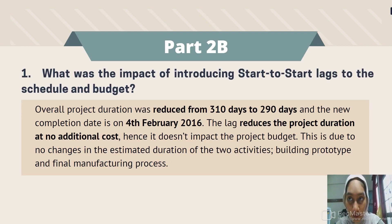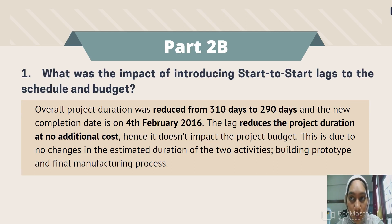The former measure managed to bring forward the project end date, and the introduction of a start-to-start lag overall reduces the project duration from 310 days to 290 days at no additional cost. The new end date of the project is 4th February 2016.